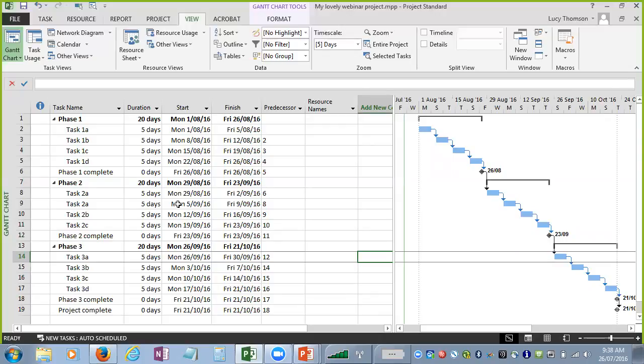task that has multiple resources on it. So I may say that we are writing a marketing plan, for example, and on that particular task I've got 3 different people working. I've got one person working on it full time, one person who's just a bit of an expert who's going to give us a little bit of advice, so they may be working on it say 20% of the time, and I might have somebody who's doing some admin around it and they're spending half their time on it. So I've got 3 assignments rather than just an individual task. Some people, when they do that, prefer to break those up into 3 tasks, and then have the resources on each of those tasks, and therefore they've only got 1 assignment per task.